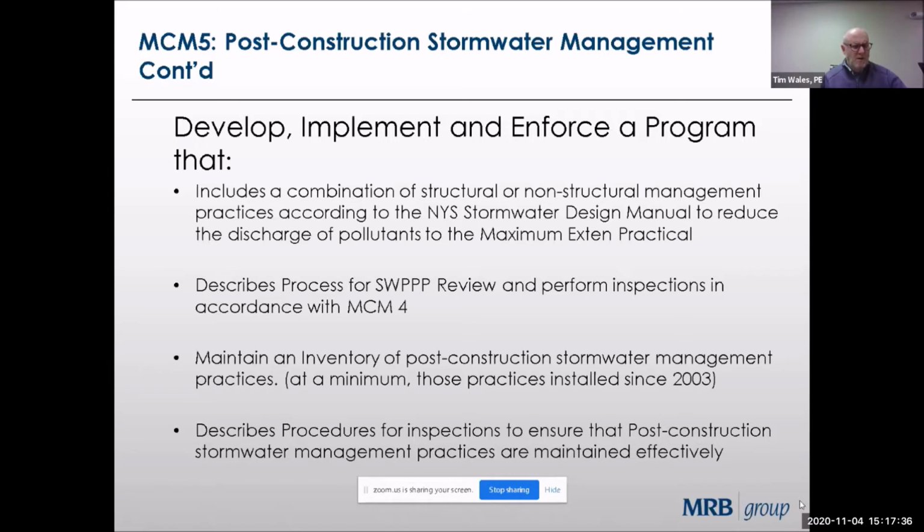So every year, sites develop that are required to have post-construction stormwater management practices, and municipalities are required to keep track of those. So how do you do that after a subdivision or something that developers left, or a shopping center? What that forced municipalities to do is add a provision to the SWPPP, making developers inspect their post-construction stormwater management practice yearly and submit a report.